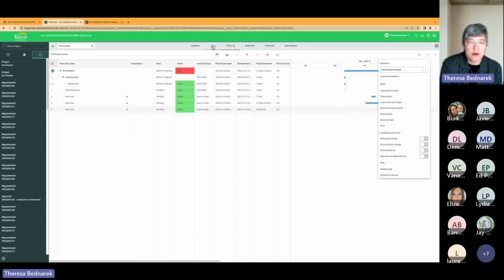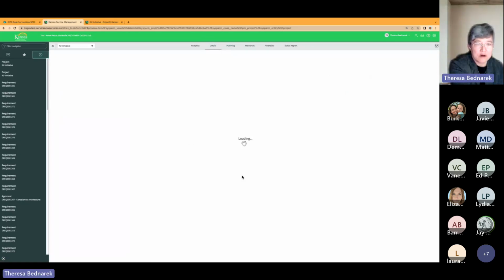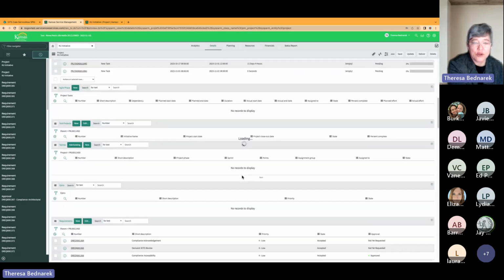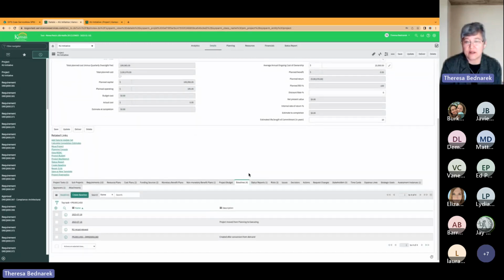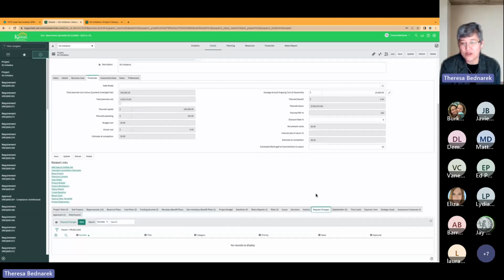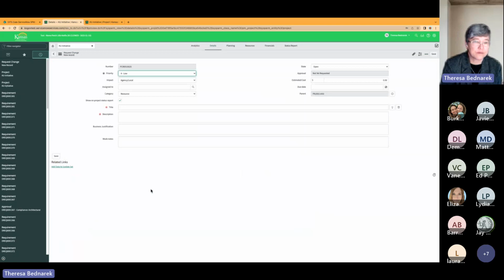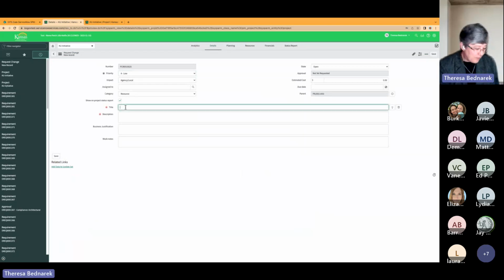So let's go back to our record, and we have to create our recast request. So we're going to introduce a new related list. We're going to go to the related list here and move over to the request changes related list and open a new record. Since I copied the name of my recast baseline, I'm going to put the same one here. And this is going to help for quarterly reporting for your KITO staff so that the query is matching your recast requests to your baseline.